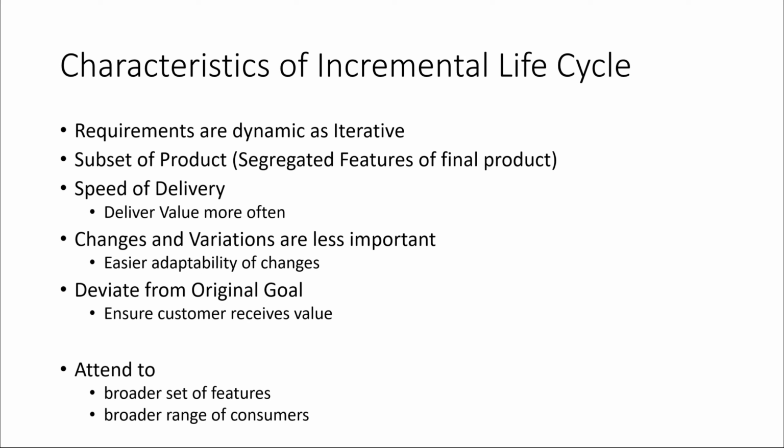Incremental life cycle optimizes work for delivering value to sponsors or customers more often than a single final product. Teams plan initial deliverables before beginning their work, and they begin working on that first delivery as soon as possible. Some agile projects deliver value within a day of project initiation. Others could take longer, ranging from 1 week to several weeks.